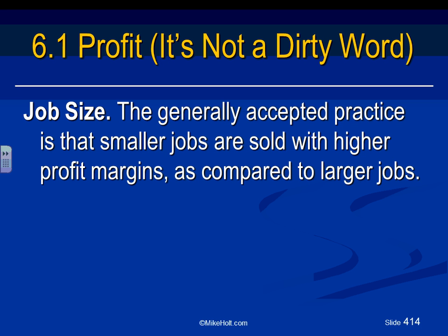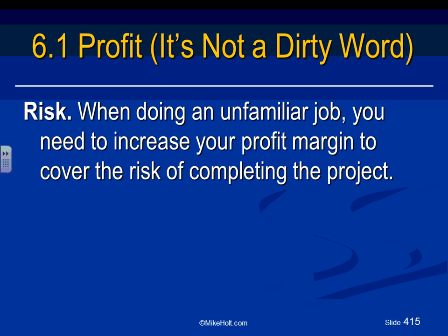I don't know. That would be interesting to ask people who are doing larger jobs, but smaller jobs can get a higher profit, especially if you have a niche, guys. If you have a niche and you have a smaller job, you can ask for a little bit higher profit. If it's a bigger job, you're guaranteed there will be national companies, national contractors, competing against you. So the trend is smaller jobs can get you higher profit.